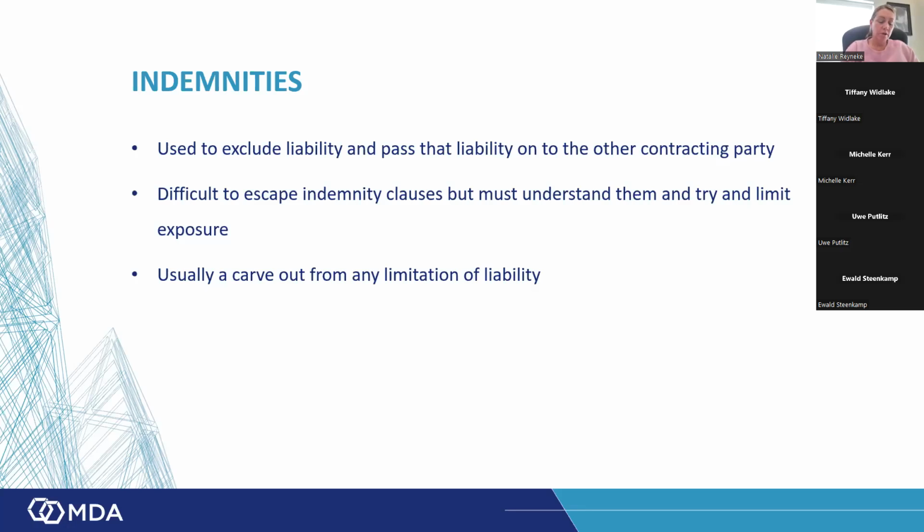Yeah, those are some good questions. A claim could only be had by one party against another based on a cause of action. If the contractor, who is the indemnifier, has caused the loss, then there's a direct link between the person who suffered the loss and the contractor.